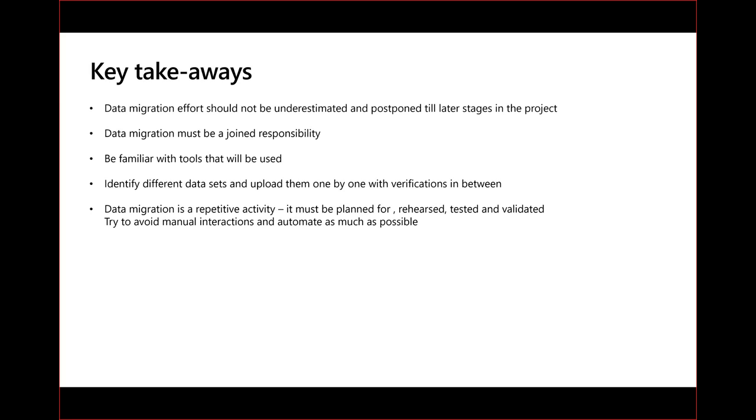Also, since it is an iterative process, try to avoid doing too many manual interactions. As I mentioned, if you cannot modify the data in your source system, make sure that you automate the step for doing the corrections, so that after the first time you have identified an issue, in the next iteration you don't have to do the same steps over and over.